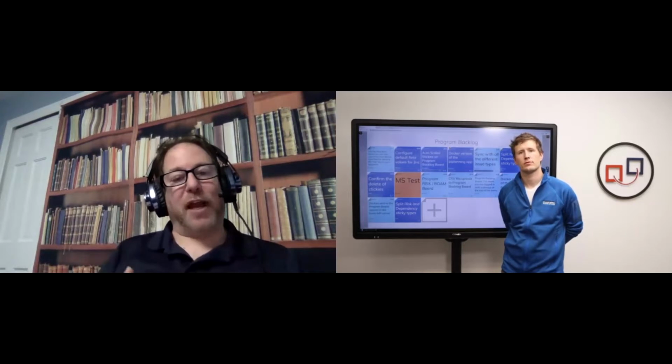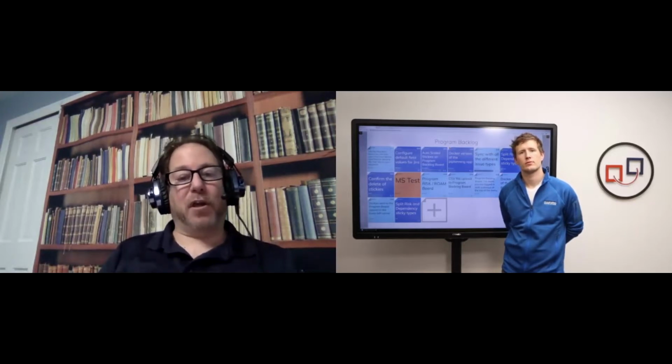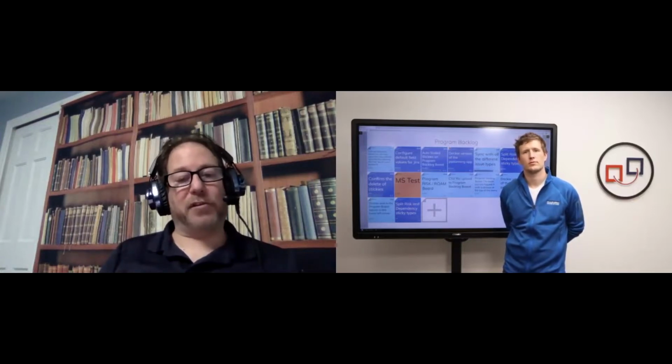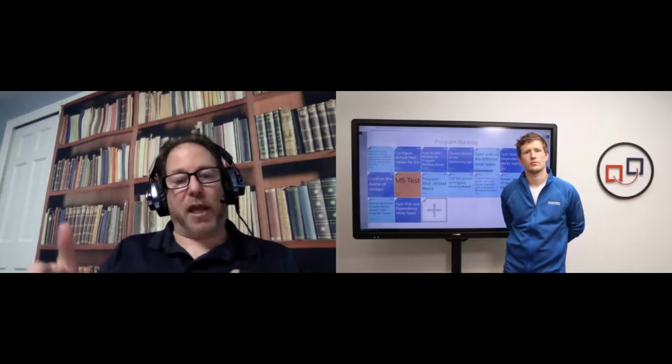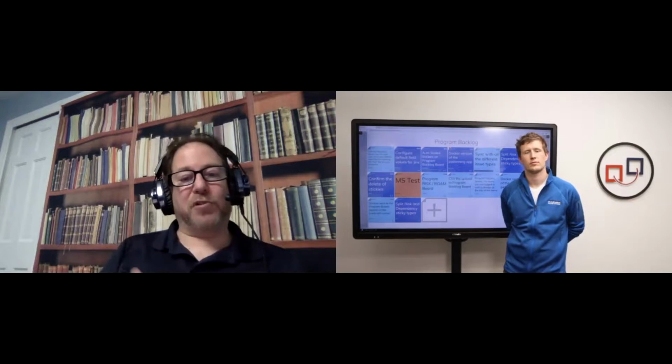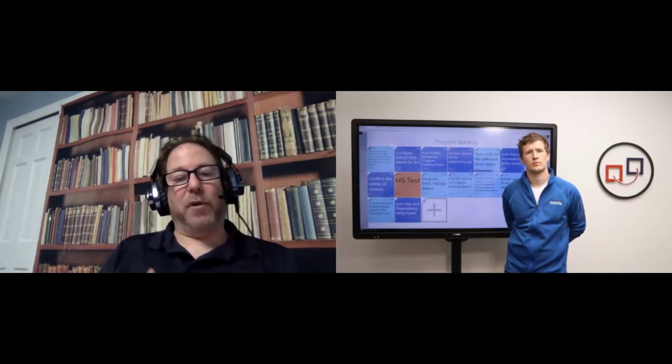And so we also have checkpoints in our PIs, in our Scrum of Scrums and PO syncs, to see what adjustments we have to make to the plans. Because PI planning is a plan, but we're going to change the plan as we go along. Each and every iteration, the teams are going to adjust their plans. So we also need to be looking at that during our SOSs and PO syncs as well.